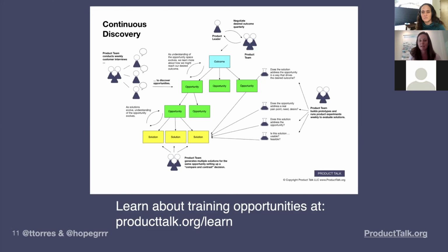One of my favorite deconfidence biasing techniques is the pre-mortem, which essentially says, okay, the idea exists in the world, however you conceived it to be, but it failed. What went wrong? Getting people to think through what went wrong almost reverse engineers what needs to go right for that solution to succeed, and frankly, any of your solutions to succeed. And so that kind of gets people back to what assumptions need to be true, how can we de-risk these to know that they are in fact true, so that we can find the best solution to get us to our outcomes soonest.